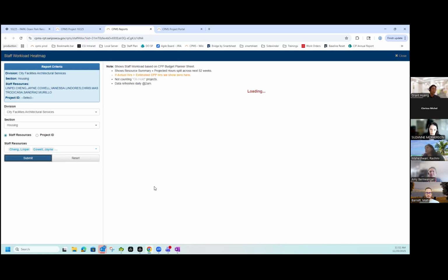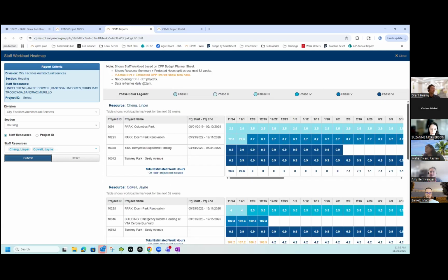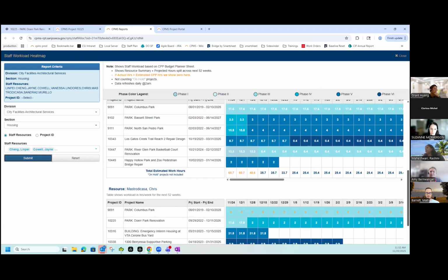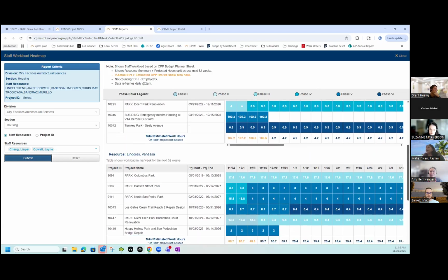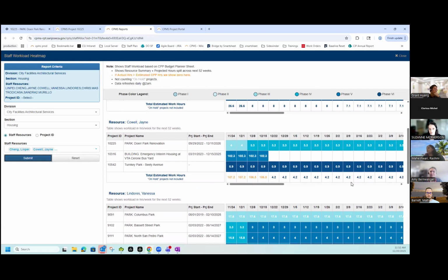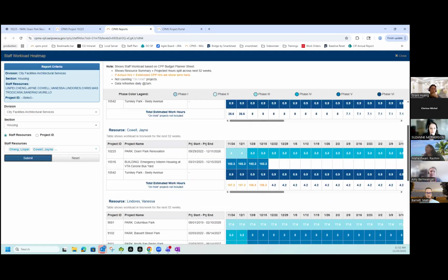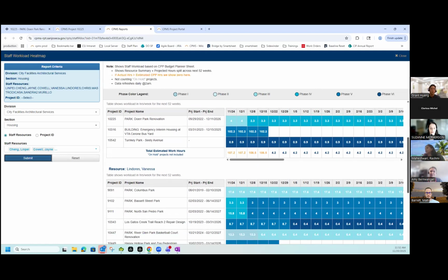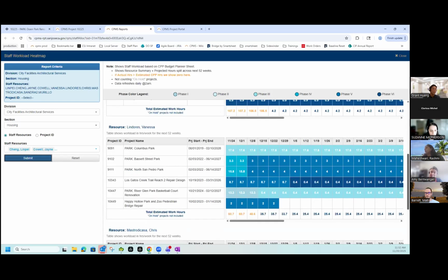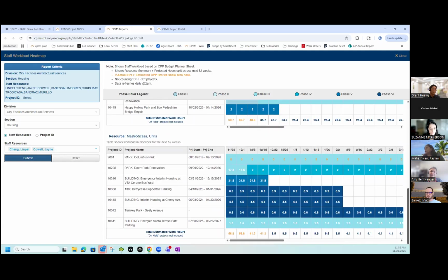And it will give you the whole workload thing over here for the next 52 weeks. And then you can see who I can assign work to and what is a good time for that. And when you see numbers which are over the top, that means this estimation went way over, right? So those are my visual clues to see at a glance if something is off. So anything which is over the top or very low numbers, or zeros, those are my clues to understand.